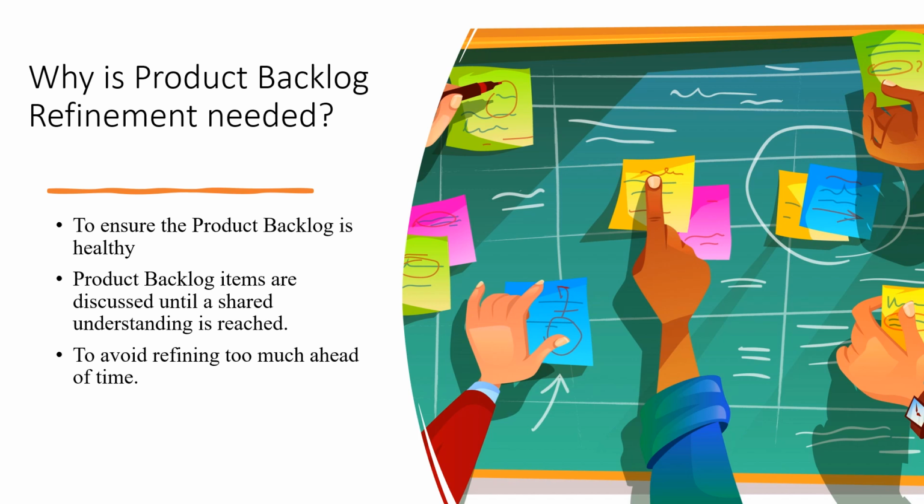So Scrum teams know that it is time efficient to refine only the top items in the product backlog, because they will inevitably learn new things that change their view of items further down or make them redundant. Therefore, Scrum teams refine only items they can move along with for the next two sprints. Ideally, we can spend some 10 percent on this refinement activity. However, it varies for every team.